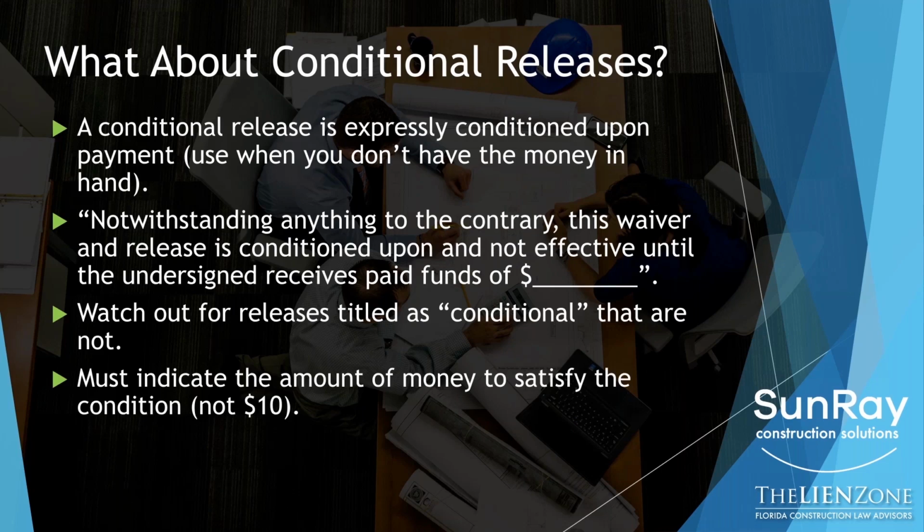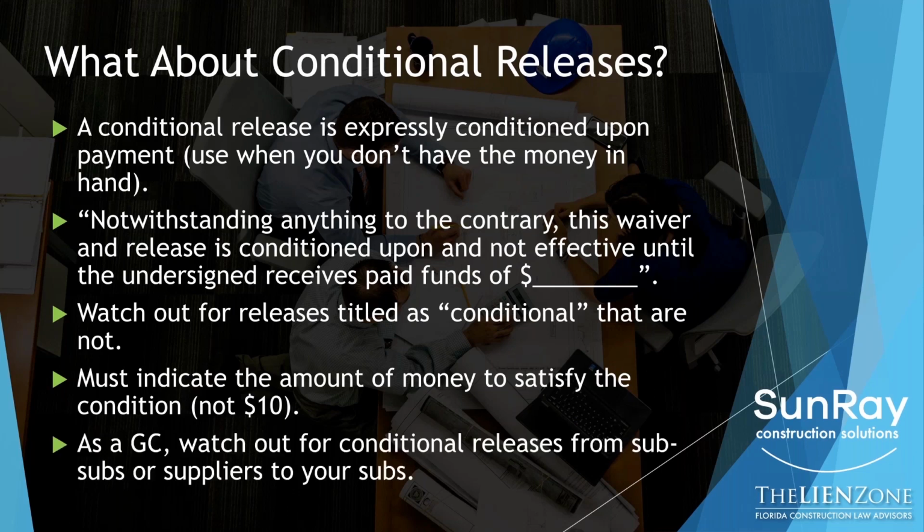Know that under no circumstances can you have a conditional release for $10, unless in fact you're only expecting $10. But if you're expecting a $20,000 check and it's a conditional release, but the condition of the release is that you get paid the amount that's in the release and it only says $10, well, then that's not a good conditional release, because it's only conditioned on you actually getting $10.